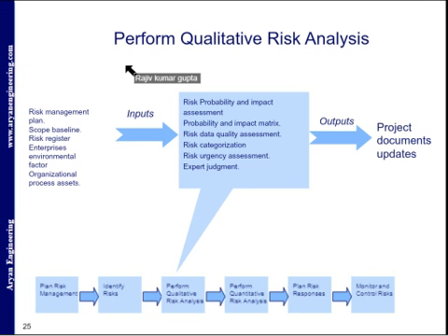It includes risk ranking for the project compared to other projects, prioritized risks and their probability and impact rating, risks grouped by categories, a list of the risks requiring additional analysis in the near term, and another is the watch list of non-critical, non-top risks. We already said that for some of the risks we are not making a plan, and those we can put in the watch list. These risks are documented for later review during risk monitoring and controlling.